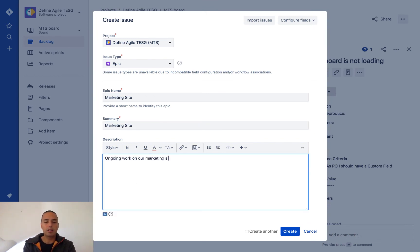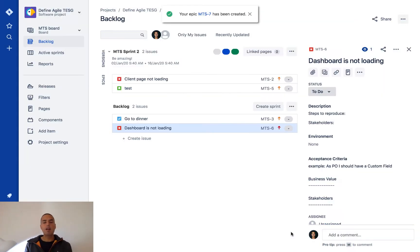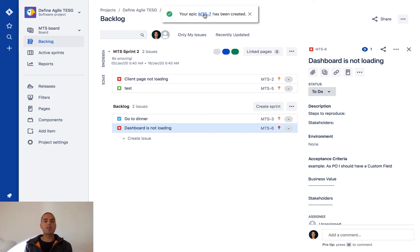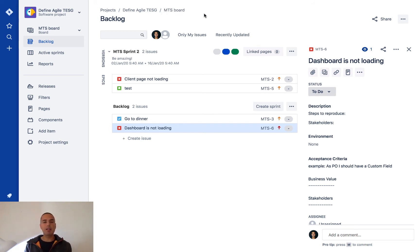Now we'll click on create. Importantly, you see that epic MTS-7 was created, but you don't see it in the backlog because Epics don't usually appear on the backlog. Epics allow us to group stuff—this is a special issue type.